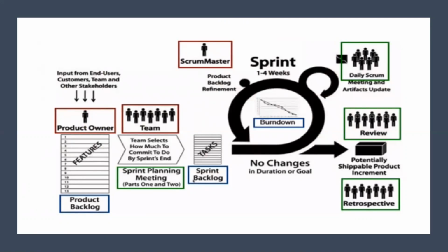Okay. So during the sprint, this enables the team to make and keep commitments. It gives the team focus and stability in the sprint. So during sprint planning and sprint development, no change is entertained in the sprint. Because if you entertain sprint changes, the team will not be able to keep its commitments.